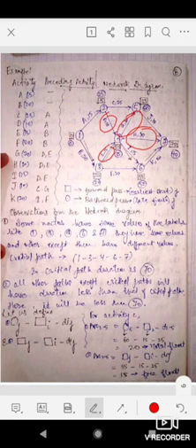You have to keep in mind that G and H follow activities D and E. So go to the node at which both D and E will be completed. Then from that node you can draw two arrows for showing activity G here and activity H here.